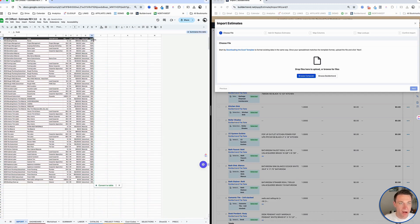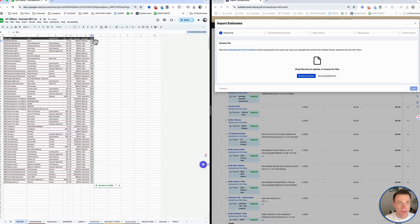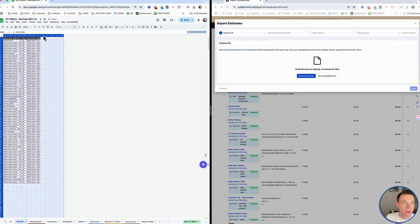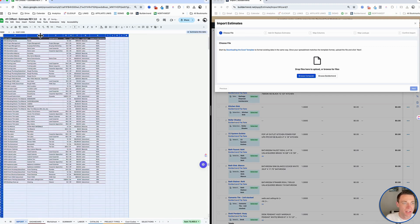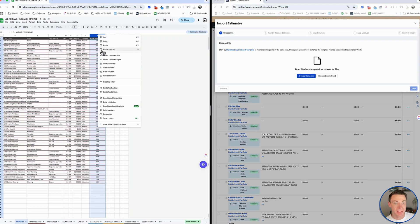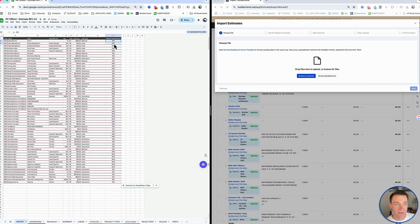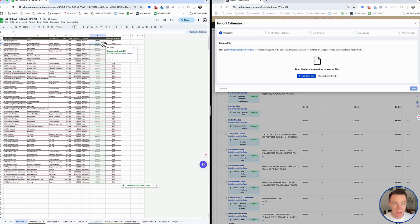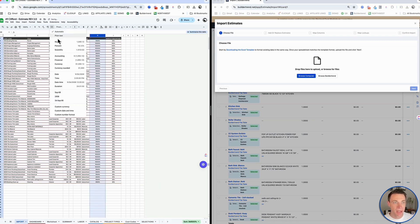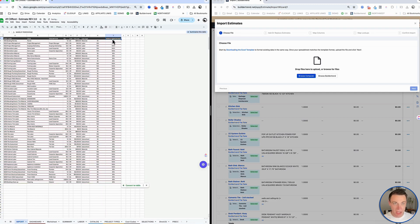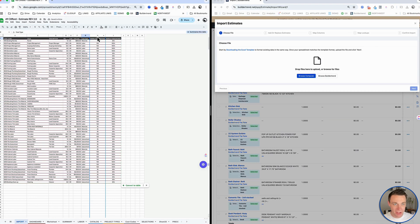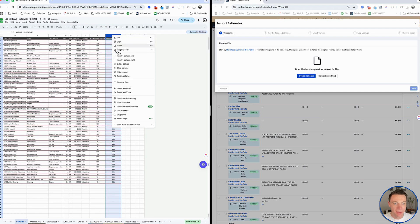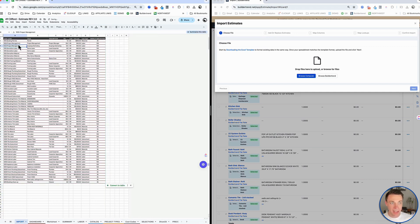One thing we have to keep in mind with this profit - let's call this markup percentage - you have to make sure you're doing percentage or absolute value. Make sure you have it in there so BuilderTrend's got it accounted for. If you just put in markup, it would do $35 instead of 35%. The other thing is we need to make this into a whole number. Right now I have it as a percentage, so it's 0.35. I need to multiply it by 100 because that's how BuilderTrend reads this. I'm going to multiply it by 100 and make this just a number without decimals. Now that I have that, I'm going to copy and paste values only just again so I don't have any calculations. I don't want to mess with any calculations being in here.